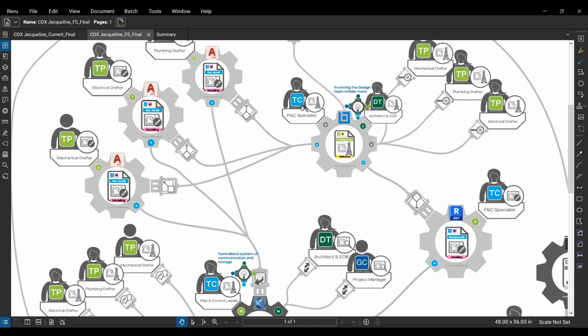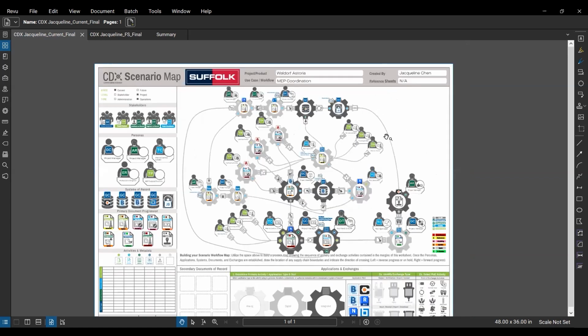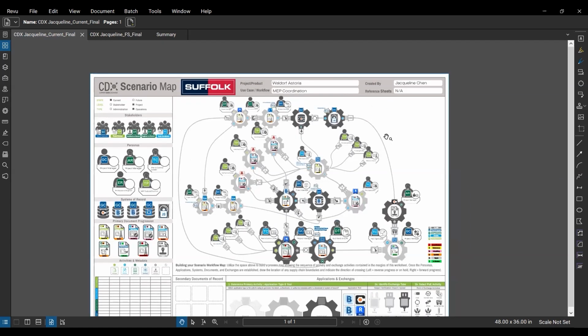Yeah, it's tricky, but I'll just say this: it starts with, as you said, design team and project delivery methods. While you think it may be easy for the design team to do these things, this gets all into the means and methods discussion. And when you try to tell somebody how to build something, they're usually just going to be like, "You're the designer, so stay on the design side." The design assist IPD approach, where design teams and trades work much more closely together to create those construction documents, is much better. But do you know what type of project delivery this was?